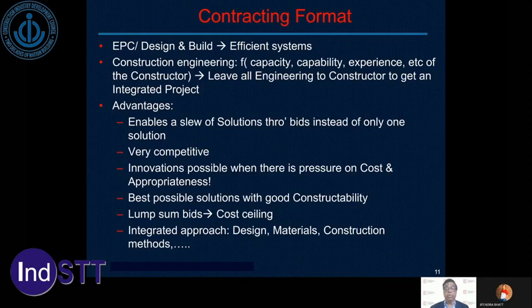to get good bids. Here, all the engineering and construction integration is done by the constructor to suit his own capacity and capabilities and to suit his experience very advantageously to get an integrated project, which often will have the least cost because it is highly efficient. The owner can get a slew of solutions instead of only one bid, one solution, to get the maximum efficiency and functionality, very competitive. And then we also have a lump sum.